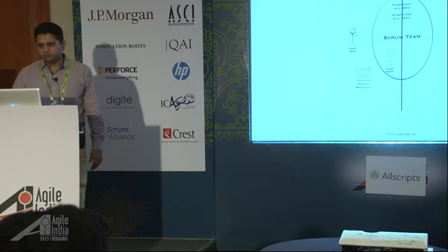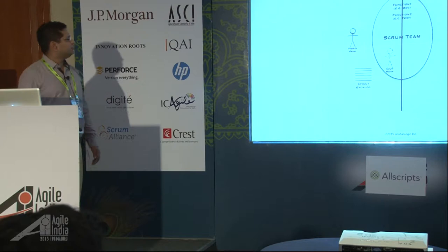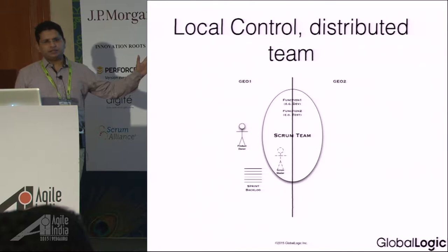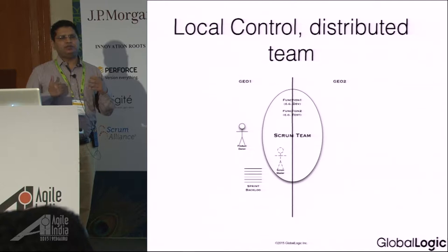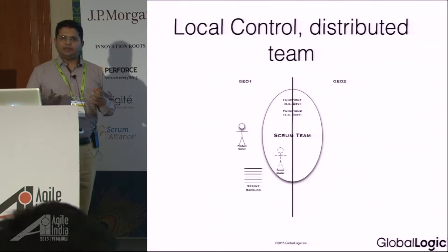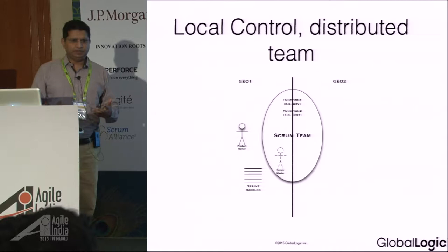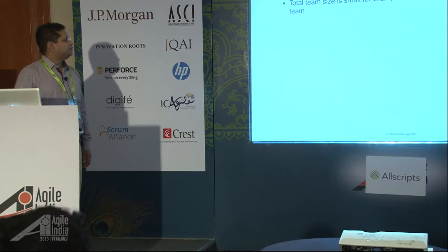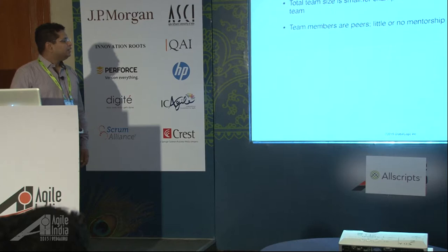These are structural patterns. The first is 'local control, distributed team,' where the product owner and the Scrum Master are on-site, with some team in the distributed location and certain people in India. This situation happens when, for example, you start a startup, you have certain front-end developers, and you want to extend your team by adding back-end developers from India. This is most useful when team size is small — four to eight persons — and team members are peers with little or no mentorship required.